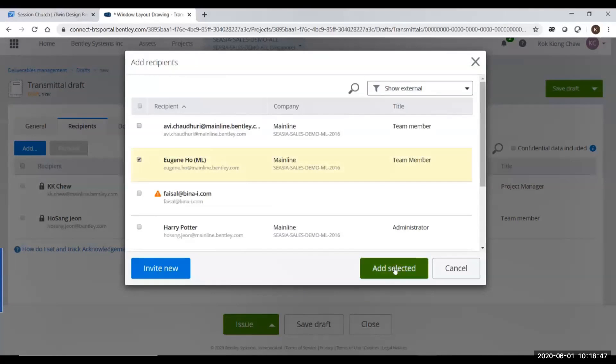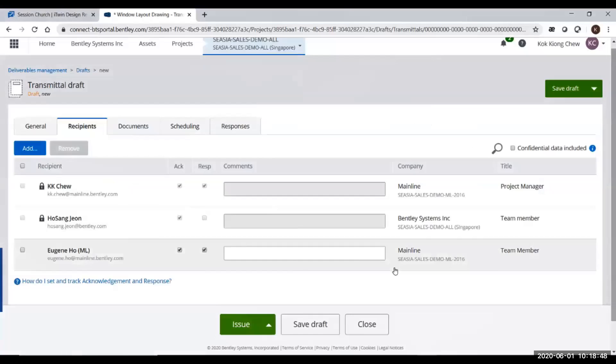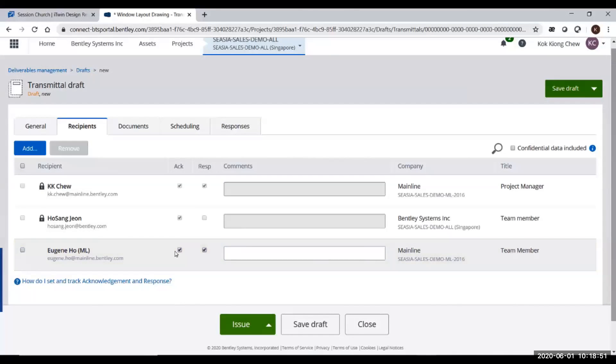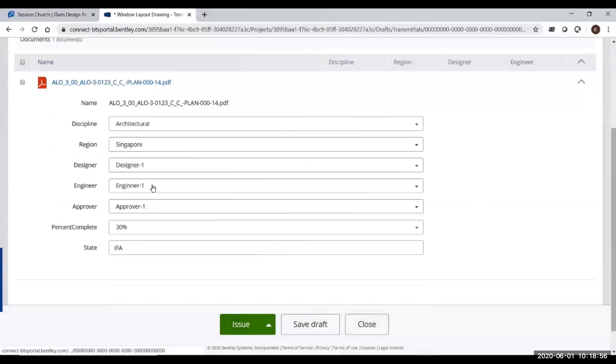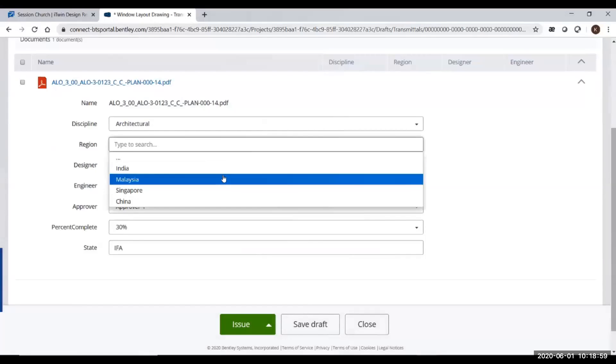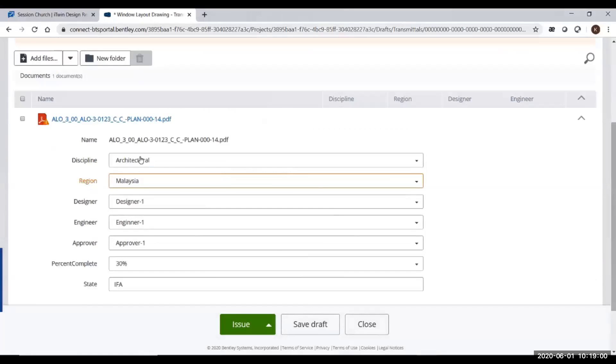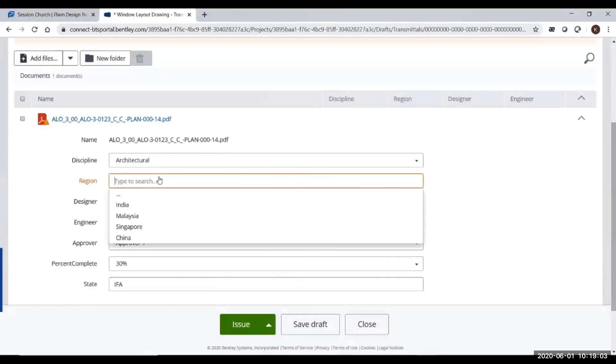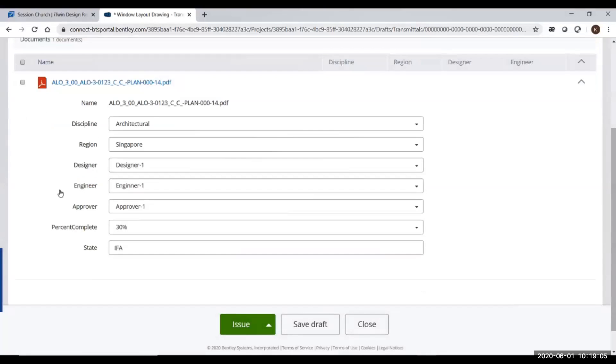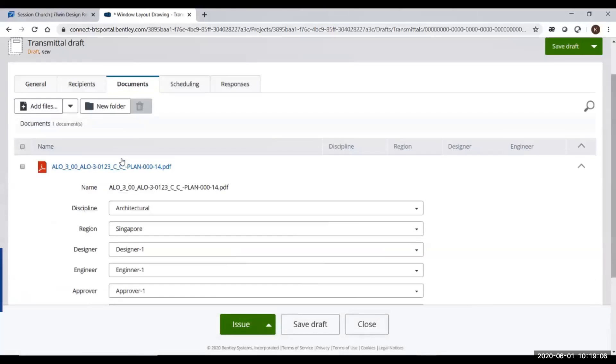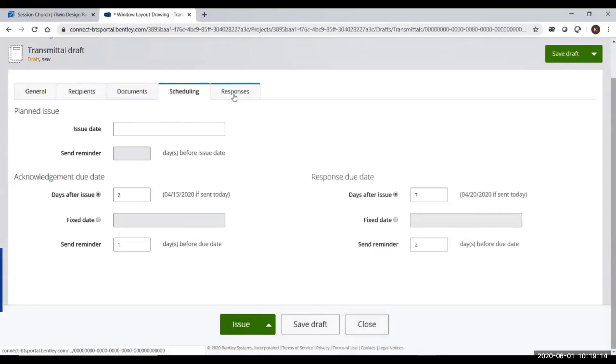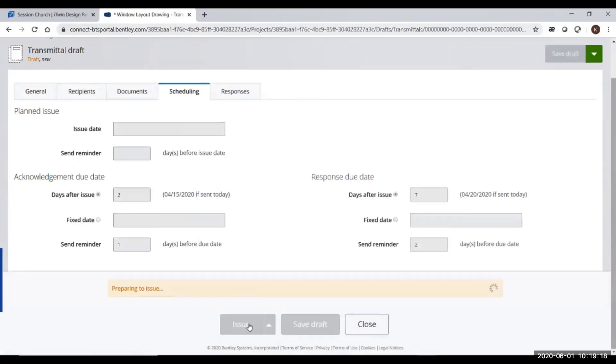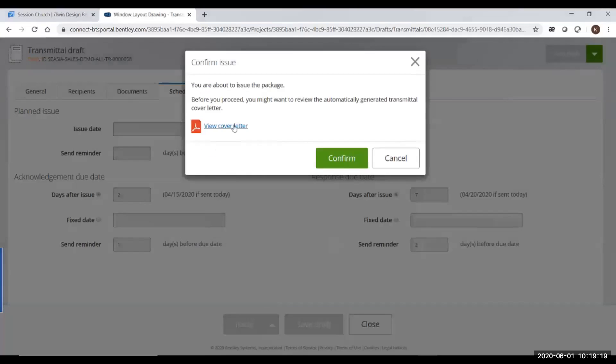You have one acknowledge tab and respond tab. I can remove them if I don't want that person to respond. In the document, I have put in my document with attributes. If I choose the wrong attribute, the system will give me an error because based on distribution validation, it's wrong. I might choose the right one. In the schedule, I can put two days to acknowledge, seven days to respond.